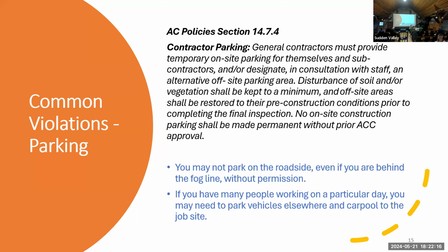We want you to have access to your building site so you get it done in 12 months. But we also need to understand where you're going to be parking and let security know that. I'd also like to point out that if you are allowed to park in the right of way, you may have to do restoration after the job is over. If soil was disturbed or vegetation was destroyed, that would have to be restored.